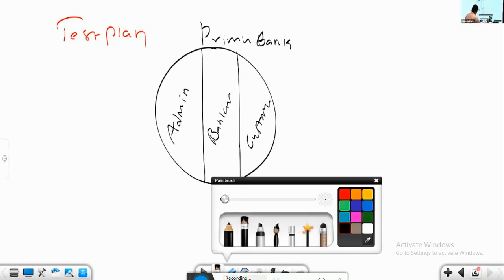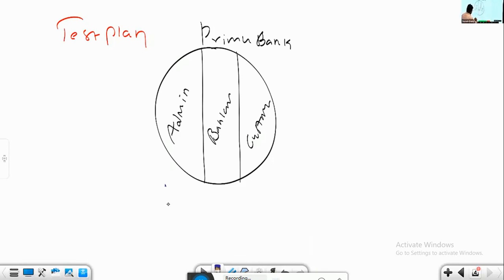Now these senior people will sit and discuss and estimate. Let's say we have a team of 10 people. How much time is required for doing functional testing and non-functional testing of the whole project will be estimated. With a team of 10 people, totally how much time is required for testing the whole project, both functional and non-functional requirements. Let's say the estimated effort is about 4 months approximately.